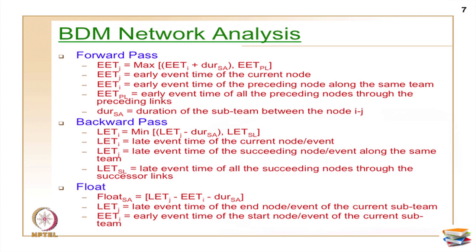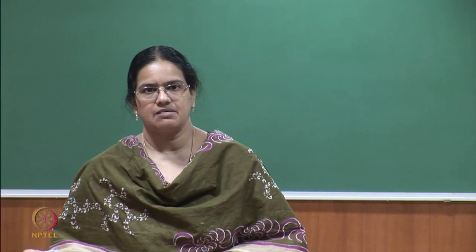Now let us move on into analysis, because you are more worried about how to do scheduling with information exchanges. Same way as your earlier network analysis, you will have forward pass, backward pass, and float. In the BDM network analysis, just like your regular network analysis, you can do two ways of analysis: activities can be interrupted, or activities can be contiguous. In the particular method I am going to explain with an example, we are assuming the activities are interruptible, which implies the activities can be broken down as and when progress happens and the critical path is accordingly calculated.